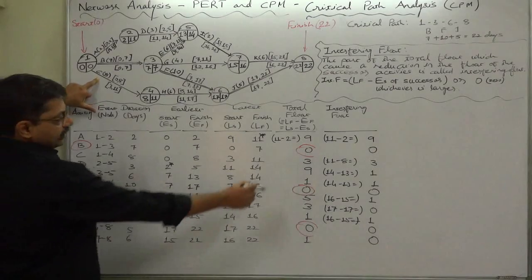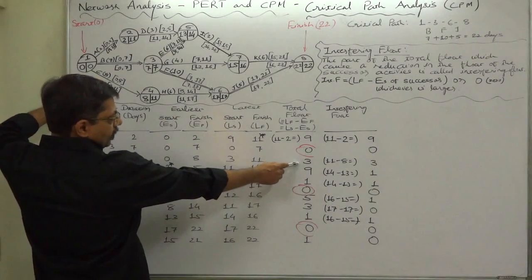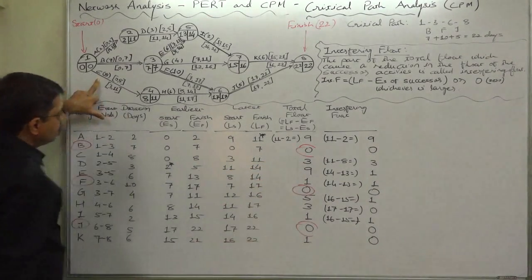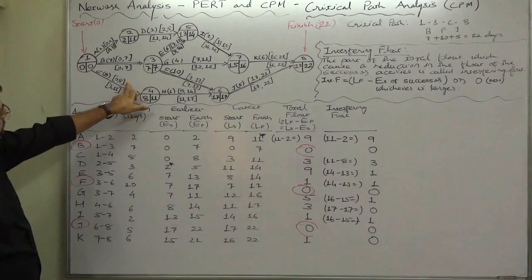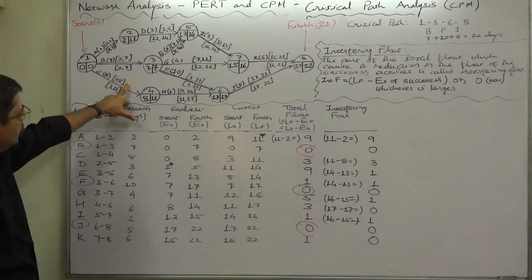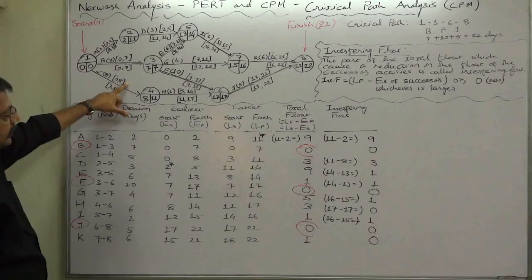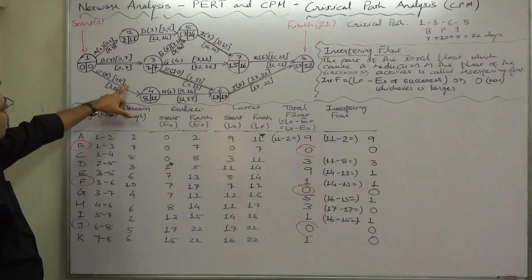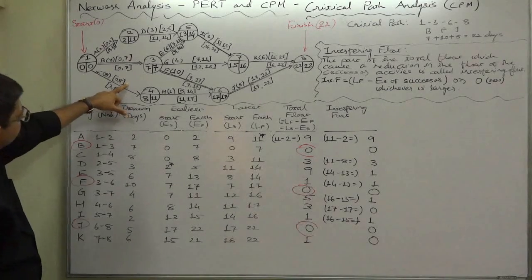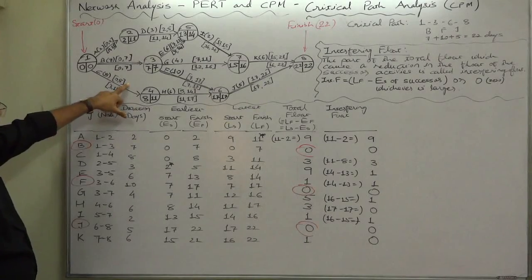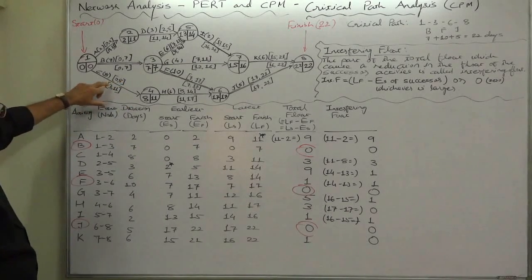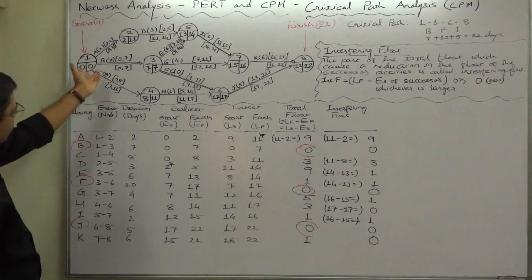C: if we use the total float of 3 in case of C, it will be finished on the 11th day instead of 8th day, because if we start it instead of day 0, we start it after 3 days.